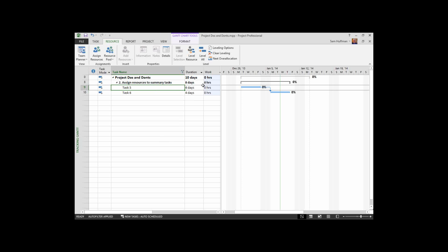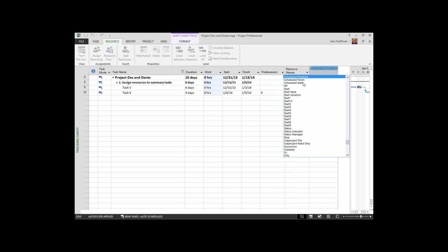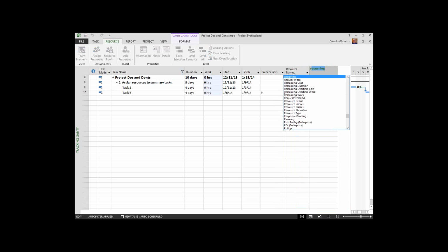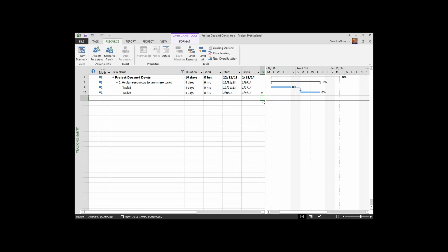The individual stop and resume dates? In Project you have fields, and the obvious one here, let me hit S, and you'll see start, and there's the stop date. If I go back and hit my R's, I'll hit the resume. So that's the initial start and resume dates. After that, we're looking at splits in the task. So these are fields that you can put here.